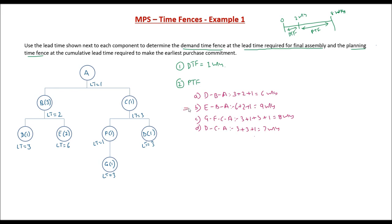Here the longest path is EBA, which has a total duration of 9 weeks. The planning time fence should be set to 9 weeks.